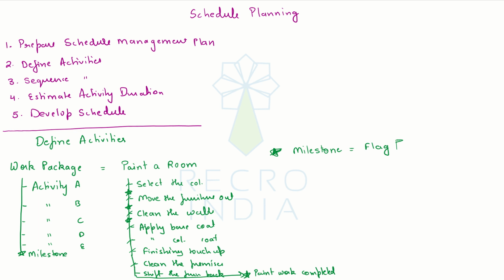And one thing that I will say from my experience is that usually it's a good practice to place a milestone for every work package, that every work package completion should be highlighted as a milestone.